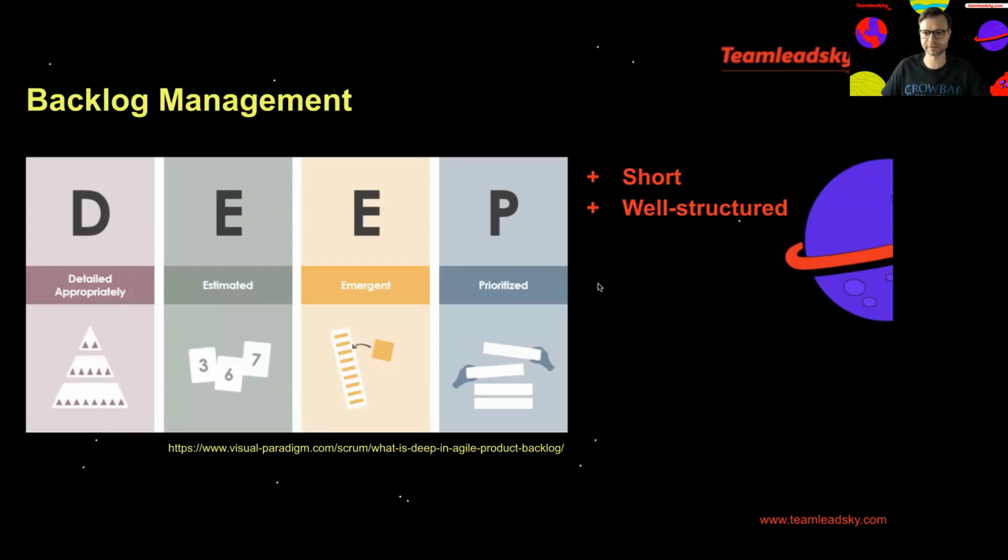That really helps. Then, talking about structuring, that's a matter of personal attitude, of course, but I prefer to have as few backlog items as possible which are not assigned to certain epics, because that allows you to filter efficiently and to keep an eye on what is remaining for the completion of certain epics, where you stand against the product goal.